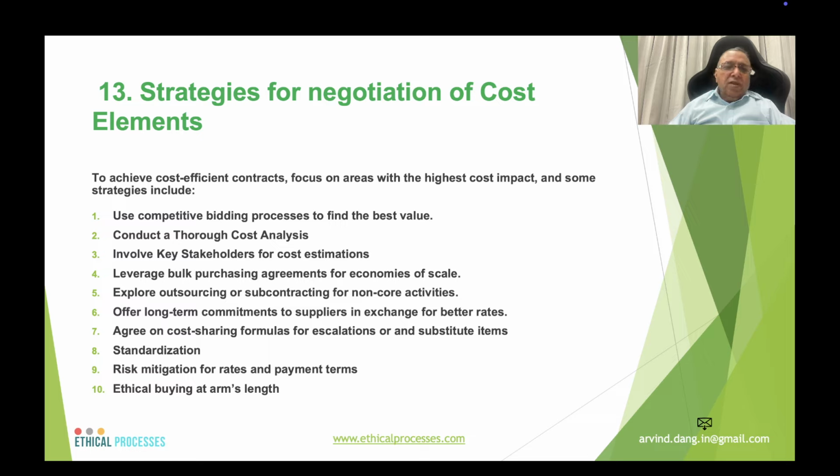Strategies for negotiation of the cost elements. These include using competitive bidding processes to find the best value, conducting a thorough cost analysis, involving key stakeholders for cost estimation, particularly for the highly technical items, leveraging bulk purchasing agreements for economies of scale, exploring outsourcing or subcontracting for non-core activities, offering long-term commitments to suppliers in exchange for better rates, agreeing on cost-sharing formulas for escalation or for other substitute items, standardization, risk mitigation for rates and payment terms, and ethical buying at arm's length.